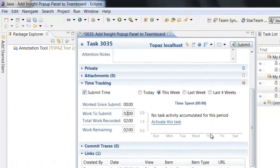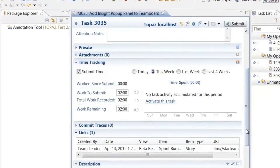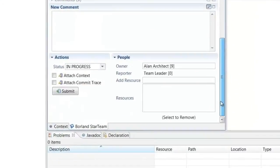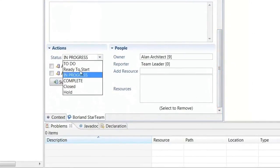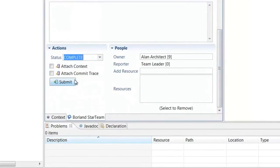When developers have changes, they can submit their time and update the task status directly in the IDE and it will be refreshed on the team board immediately.